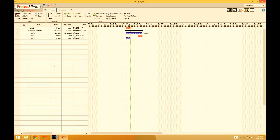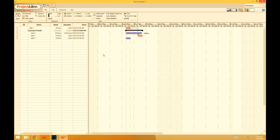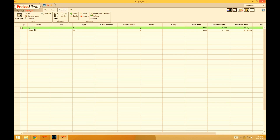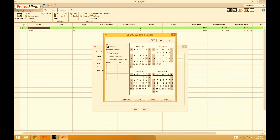Now I'll show you how to adjust the calendar on the computer. We are in the task menu with the chart showing. I have the small calendar icon up here — clicking on it will show you the standard calendar for all. I'll then set next Friday to be a non-working time, which means that nobody associated with this project is going to be working on next Friday. However, we also talked about wanting individual calendars. For this, we need to go back into our resource view, double-clicking on one of your resources and clicking on the calendar. Now I'm looking at Johnny's calendar — Johnny is still not working next Friday, but he's also not working on next Thursday, so it's just non-working time, and now Johnny is not working neither Thursday nor Friday.